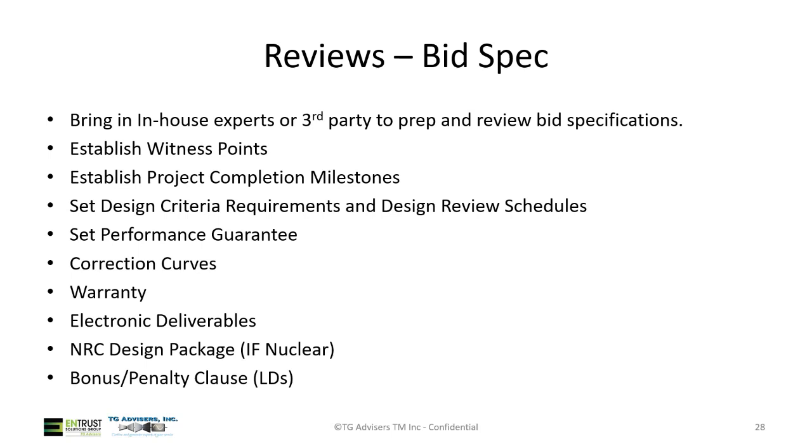Establish the witness points up front. Establish the project completion milestones. Set the design criteria. Your performance guarantees, correction curves, what you have expectations for there. Any warranty requirements that you have, any expectations you have for a warranty.